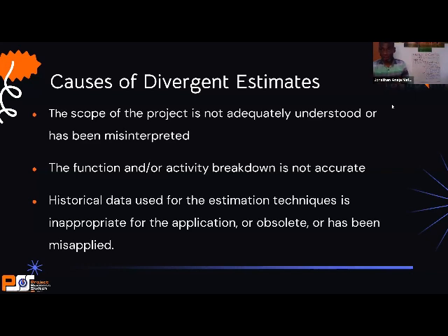If you want to buy material, you cannot just use parametric, analogous, or top-down. That will not break down into activity. Because if you break down into activity like this, you can easily calculate the quantity of cement, the quantity of sand, the quantity of stone. So at the end of the day, when they finished doing that, a drain that I thought would cost me 5.4 million went to 12 million naira, 12-point-something million naira. Are you following me? And it gave me cause for concern.